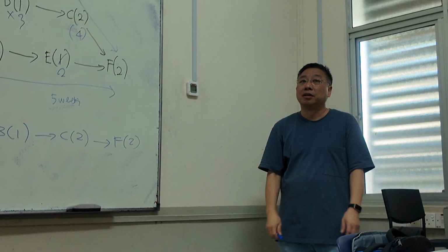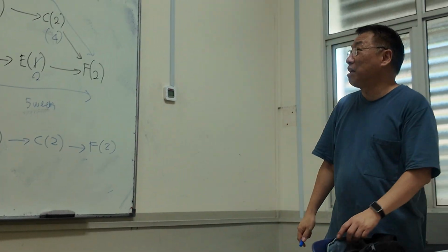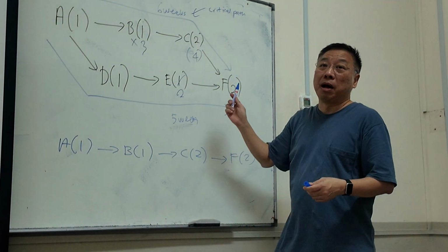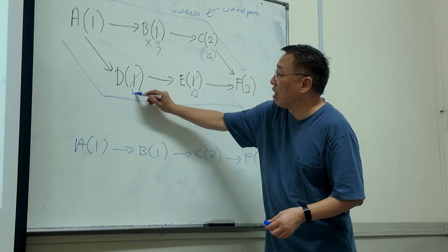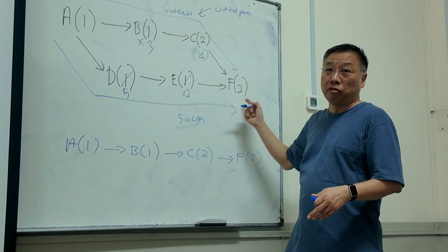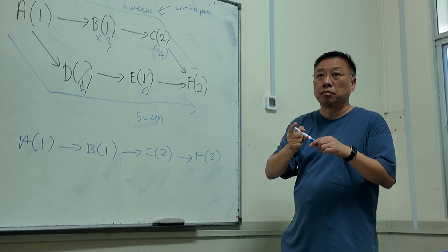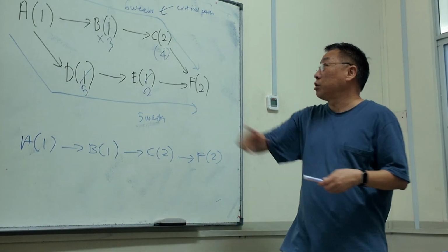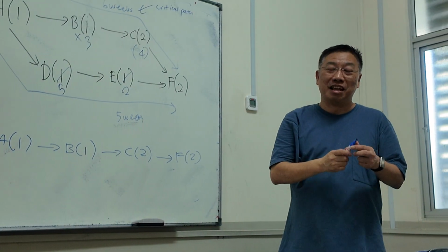Yeah. What is another path which delays more than the... Very good question. So if another path delays more, then yes, you will change the critical path already. Right? Because if this delays by 5 weeks, you will have to recalculate the critical path. Then you will identify, oh, this is no longer the critical path. This is now the new critical path. Right? And is it possible to have two? No. Unless, of course, both of them are 6 weeks. Then possible.